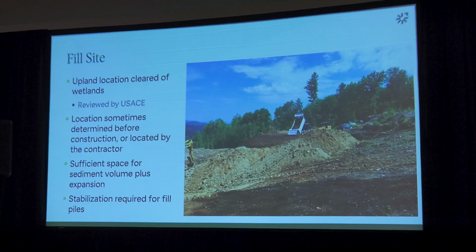So at this site, the landowner claimed that they were going to be able to push off, the contractor wasn't going to have to do anything up here, but it turned out that the landowner was just conveniently unavailable and slow. So the contractor wound up having to bring his own equipment up to deal with the fill site as well. That wasn't really clear ahead of time, and I think we're going to be more diligent about really figuring out what's happening at these sites if they aren't controlled by the contractor.